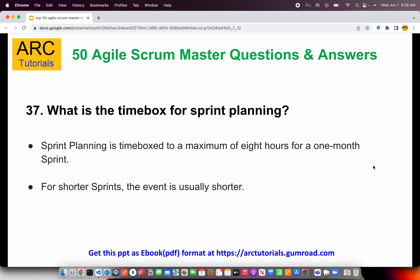What is the time box for sprint planning? A lot of times sprint planning goes on for hours and yields little productive output. That's where time boxing comes in — you time box to a maximum of eight hours for a one-month sprint. Your sprint planning should not exceed eight hours for a month of sprint. If you do, you're wasting everyone's time. We should have shorter, clear stories with well-defined acceptance criteria. For shorter sprints, the event is usually shorter — if your sprint is only two weeks, you cannot spend eight hours planning. You might spend one or two hours and get going.